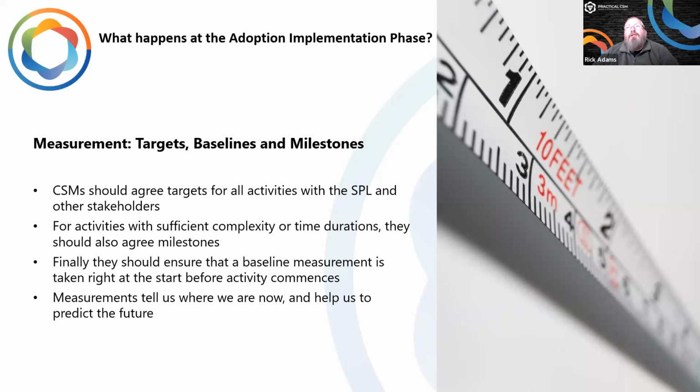So we need to agree how we are going to measure all of this ahead of time, so that as we move forwards with the plan, we can then do that measurement that we agreed. Because ahead of time we agreed that if we can train everybody to a level where they can take the test and if they get 70% or higher, that is acceptable. Then we can give them a test and see if they get 70% or higher. And if they do, then box ticked, we've now trained them. So we need to know what the baseline is. We need to know what the correct level is to accomplish for each thing. So we need to work that out, our baselines, our targets, and our milestones.